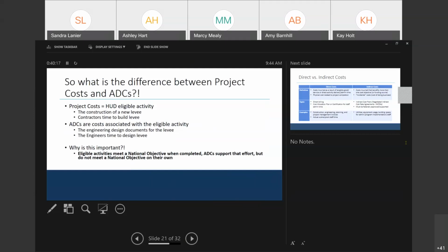If you procure competitively, and by competitively, fair and open competition where that RFP goes out and it is selected based on the evaluation criteria as the lowest and best bid, then the contract may be billed as lump sum to include the cost incurred plus overhead and profit.